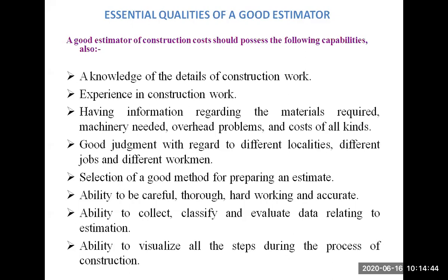You are going to focus on the different parameters, or we call them specifications, which are associated with the construction activity. Some specifications, like excavation. For excavation, which information do I need? After excavation, the PCC bed is there. Which information do I need to collect? Whether I have the length, width and depth.